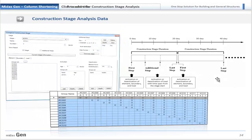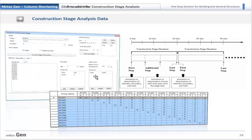This is the dialog box where the duration can be specified for each construction stage, and element, boundary, and load groups can be activated or deactivated. A useful feature is the load step function, which allows the user to activate loads at different time intervals within the same construction stage. The program also provides a tabulated construction sequence for easy identification.